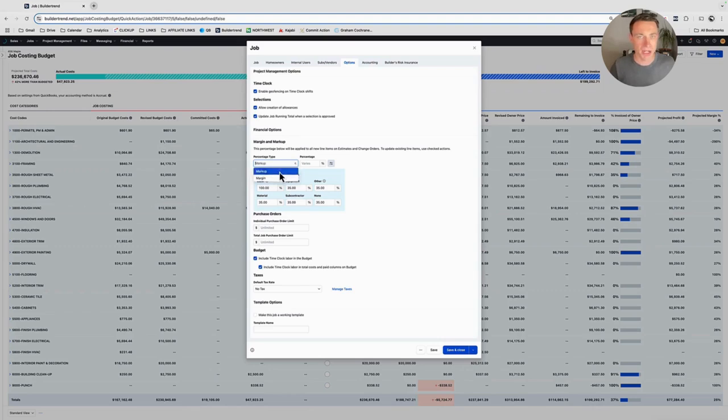And we do pretty much a blanket 35% with the exception of labor. So labor, we're giving a cost per role that's going to work on a project. And then you're going to add your cost basis for all of your labor into the back end of Buildertrend as well, into each user. And we've established about 100% markup on our labor.